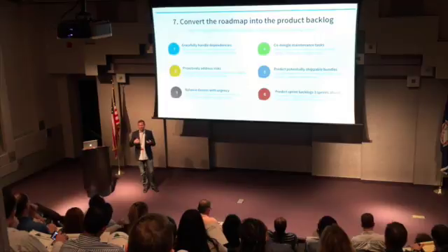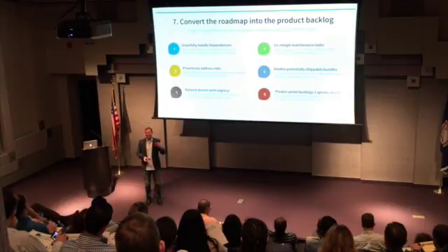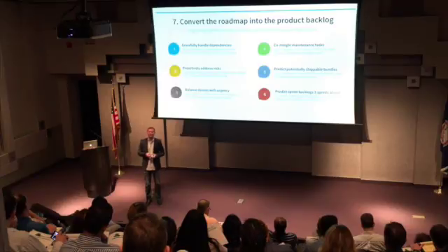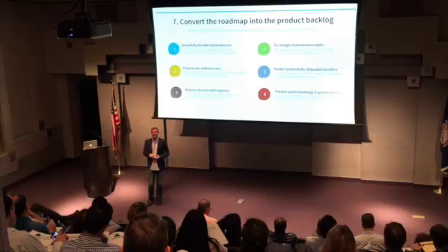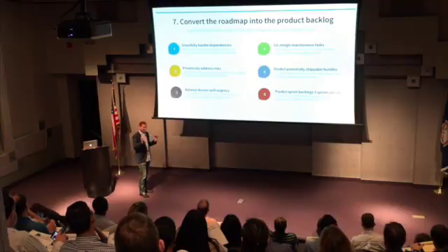Because if so, let's figure that out, and we'll make sure that the user stories are structured that way. Or even more importantly, do we have a brakes versus acceleration problem? Let's not, for example, give the user the ability to create something that they can't delete or edit. I see that kind of thing happening all the time. Oh yeah, it's valuable to be able to create an entity in a database, and then you can't do anything about it once it's there. And we'll get that out next spring. No. Minimum viable product is all CRUD operations simultaneously. Then you can go ahead and put it out there.